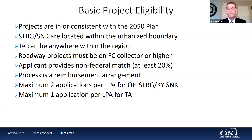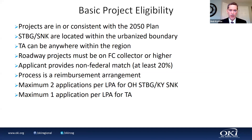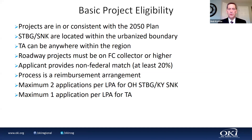Remember that's a reimbursement arrangement — as you begin to construct your project and submit bills to your state agency (either ODOT or KYTC), they will reimburse you for 80% of that cost. Maximum applications per LPA: two Ohio STBG and two Kentucky SNK, and one TA per LPA.